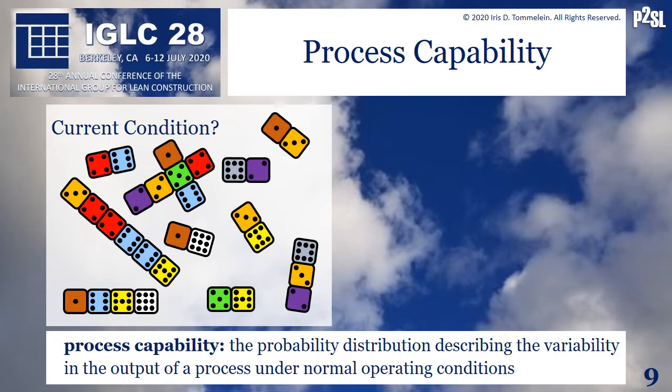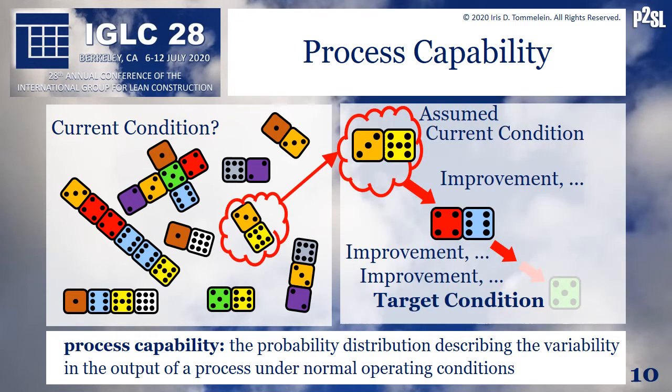Given that we said that the customer wants their project in 24 weeks, achievable when each trade uses an all 5 die, which die among those available should we pick? Perhaps the trade selected a crew with 3-7 process capability and then, having committed to meeting the Tact plan that requires passing 5 units each week, was able to improve that crew's performance so that the crew shows up on the project with a 4-6 process capability.